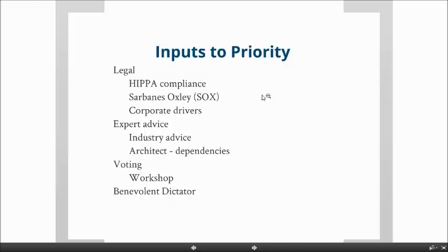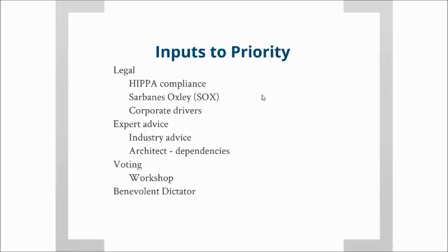Now, in Agile, I always say that there are 3 things that create priority. The first one is value, the second one is dependency, and the third one is risk. In Agile, again, if you remember, basically all the priorities, or all the user stories, the requirements, are stack ranked.